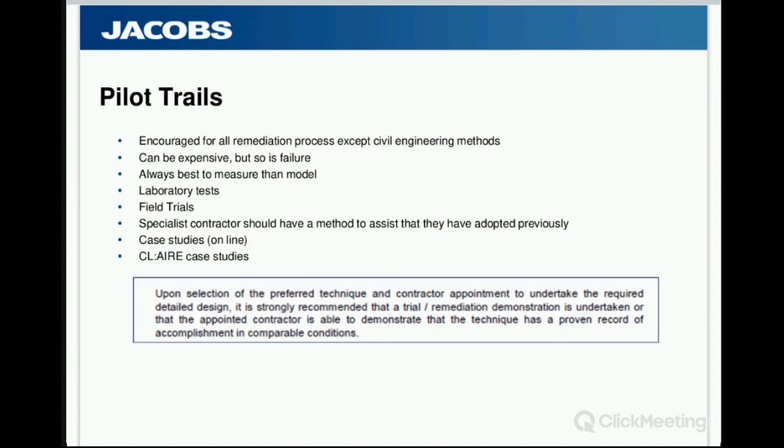There is always a cost to these things, and I know the clients are quite often unhappy with those costs. I think the most expensive one I've ever done is about 100,000 quid, which is quite a lot of money in order to find out if something may or may not work. So it's always going to be a bugbear. There's no way around it. But certainly to commit to hundreds and hundreds of thousands of pounds worth of remediation without a pilot trial on any in situ or ex situ treatments, I would advise is foolhardy.